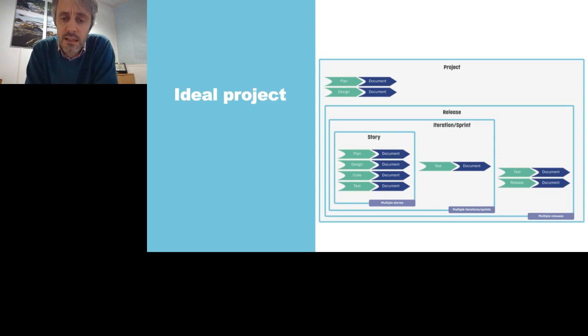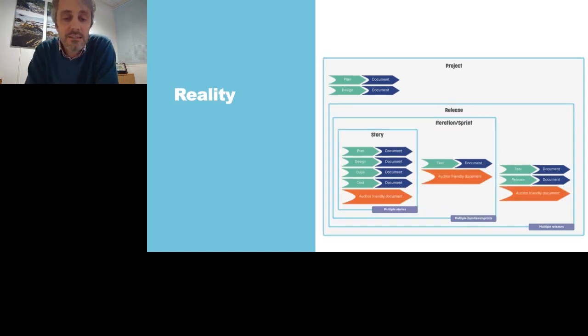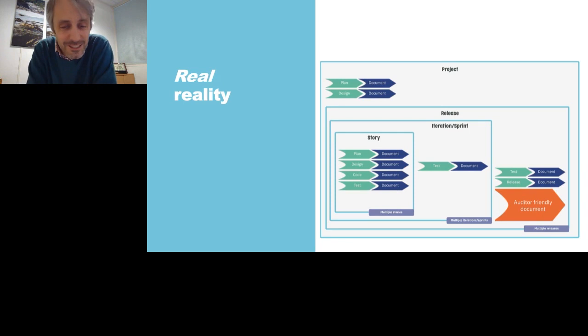You've got all these activities, and they're probably all producing documentation. Documents are coming out, all of them at the output part of their process. And in TIR45, it looks like that's your living documentation is there and happening. What we see in practice, in reality, is those documents aren't auditor friendly. So a compliance team working with engineers end up having to compile those as we go along, which is a bit laborious. In the real world, we often see that this gets delayed and doesn't happen as we go and becomes a big activity around the release time.